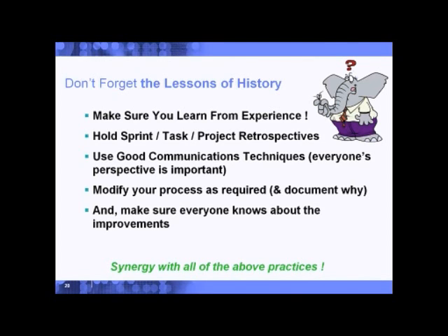How do we do that? Well, classically in an Agile project, lots of communication. So retrospectives, basically, small close-down meetings, if you will, where we, in a very short, sharp, focused way, collect everybody's input, understand the good, the bad, and the ugly, make sure we document it, make sure we roll it out for future. Good communications are absolutely crucial to this, and everybody's perspective is definitely important.